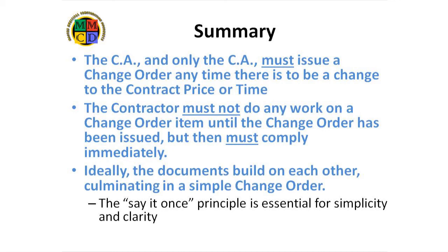drawings and specs to define the work, a contemplated change order, a quotation culminating in a change order, often following negotiations. The say it once principle should be used in all documents in this sequence. This makes it easy to keep the documents simple and clear.